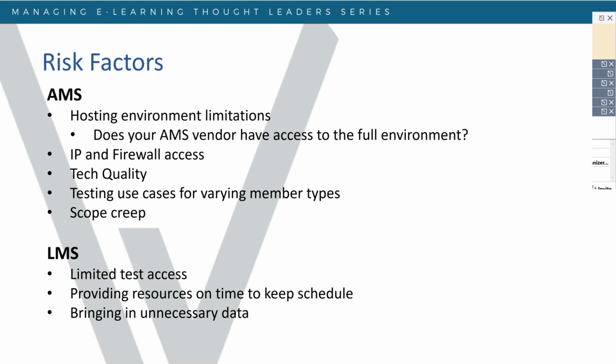From the LMS side, one of the risk factors that we run into is limited test access. One of the things we ask during that web service requirement, if we go back to that previous slide where we're talking about the process, is that we also ask for test users, so we're able to test on our end to make sure things are working as well. Now, sometimes when we have test users, if you don't expose all the information that they need in the AMS, it's hard for us to validate that things are actually working as they should. So sometimes that limited test access slows down the entire development process and testing process.